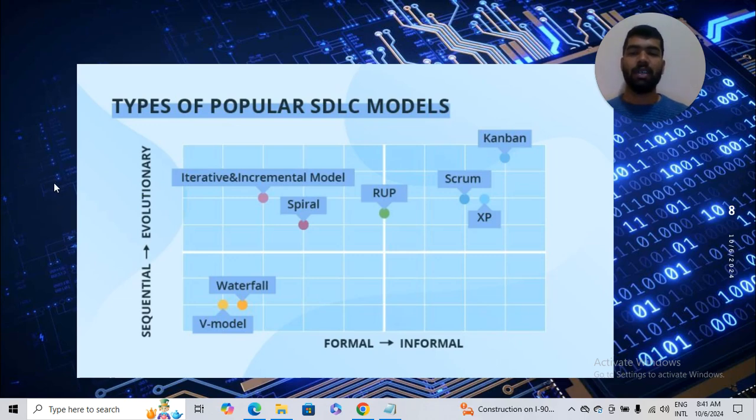We can see the incremental model, which is split into several iterations. New software modules are added in each iteration with little or no change in earlier added modules. The other model used is the iterative development model, where software changes on each iteration, evolves and grows. As each iteration builds on the previous one, software design remains consistent. Software is basically delivered in parts using this model.